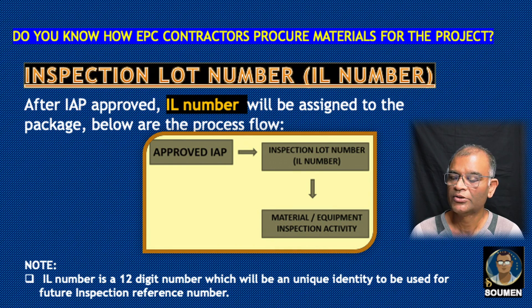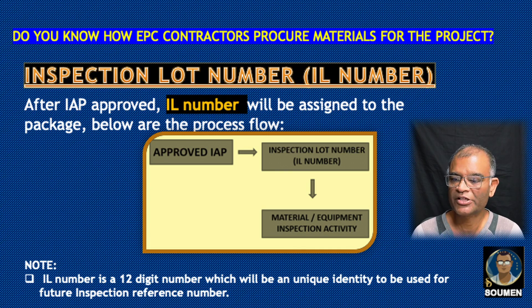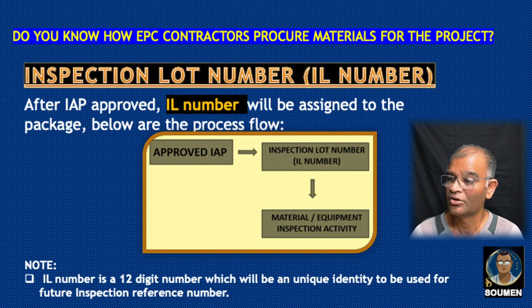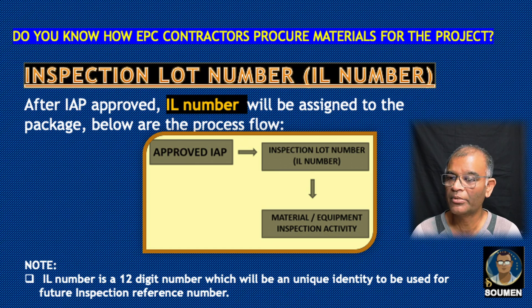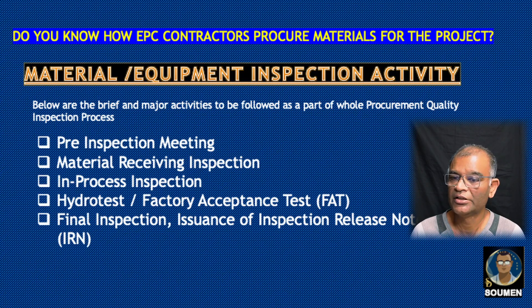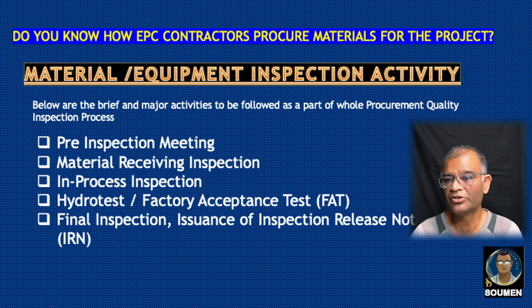The Inspection Lot (IL) number is a unique 12-digit number used to identify the future inspection reference for a particular material. Once the IAP is approved, the IL number will be assigned to the package. Without the IL number, nobody will inspect the material. The approved IAP leads to the IL number, and then material or equipment inspection activity may proceed.